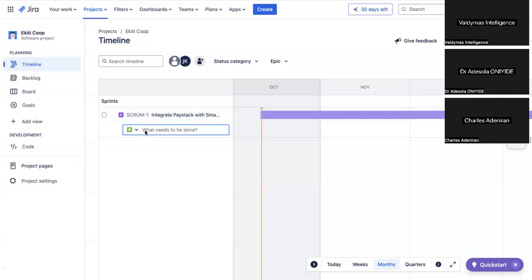In some organizations, we call it a decomp meeting. Decomp means decomposition, like you're breaking down. And while you're doing the decomp, you're already typing out what the main epic will be and what the stories will be. In some organizations, they first capture every detail in an Excel document. And then either the product owner, business analyst, or sometimes the scrum master will go ahead and help input it into Jira.